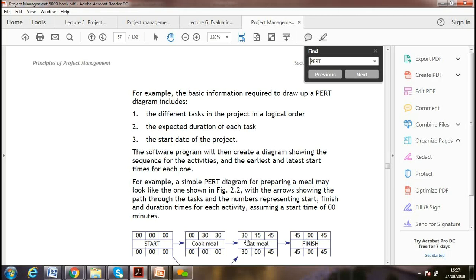So we are digging a basement, and then side by side we can do the walls and the outside work, maybe inside and outside the house as well. So we are doing two tasks. Or when we reach the roofing of the first floor, we may be doing second floor construction while doing the finishing on the first floor. So that's how we can do parallel tasks. You need to look at the different tasks logically.